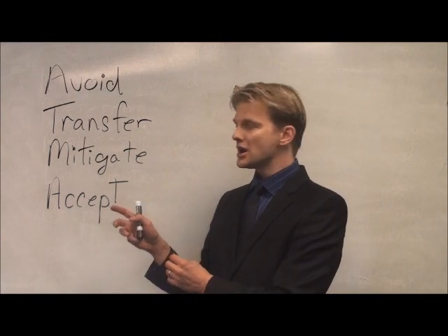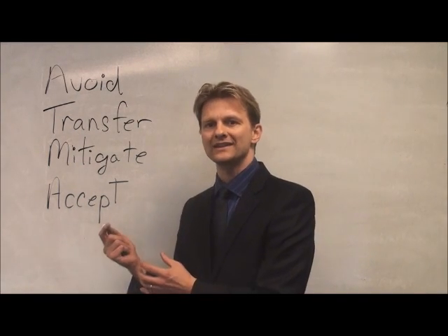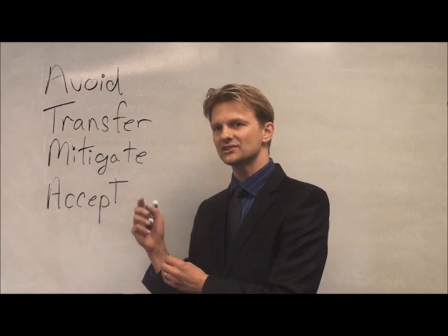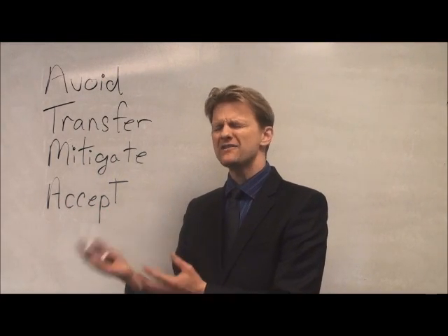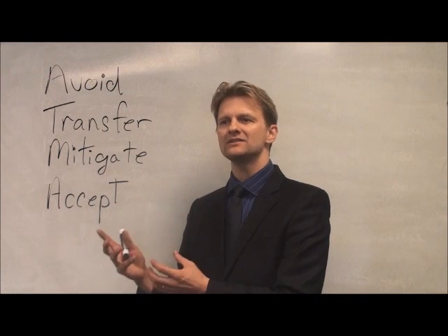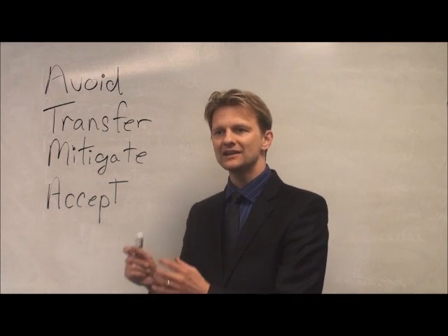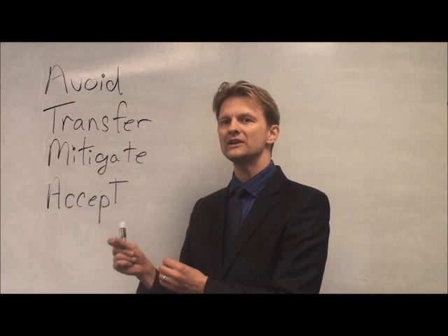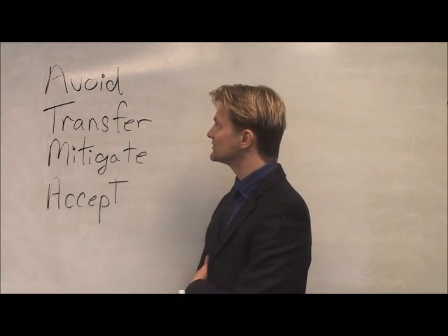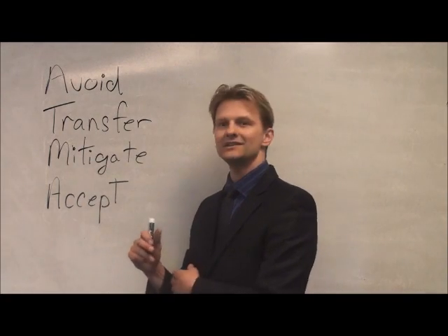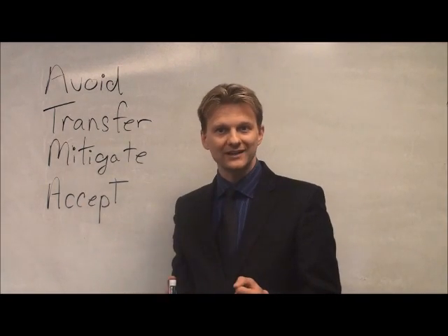Now these are more about the negative risks, because there's positive risks which you might want to actually endorse and enhance, but by far 90% of the time it's always about, okay, it's a negative impact to us, so what are we going to do in terms of a risk response strategy? Well, let's look at these 4. The first one is the best one, avoid the risk.